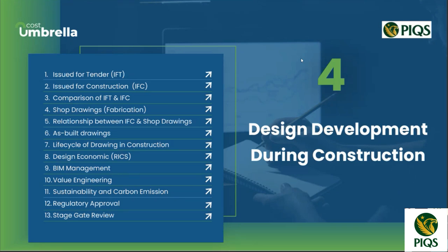Sometimes the designer, once they are doing the design, is designing the project from a design point of view, but maybe it's not practical on site. Once the execution is started, the contractor gives you the feedback. Then, based on his feedback, the design slightly changes. So whatever changes are implemented after the signing of the contract will lead to a variation order.